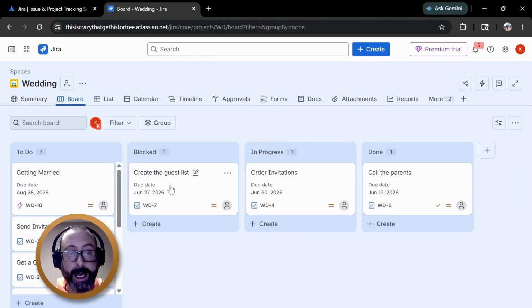The creation of the guest list was tough, and we're currently blocked on this for a reason. Why? Maybe we can't get in touch with Joe. We really want to invite Joe. He's our best friend. We've hung out with that guy for 20 years, but where is Joe? He's just not picking up his phone this week. Is he on vacation? We don't know. So it's blocked. We got to maybe slip that work into the future, which is dangerous because whenever you slip tasks into the future, you're slipping the whole project into the future when this happens.